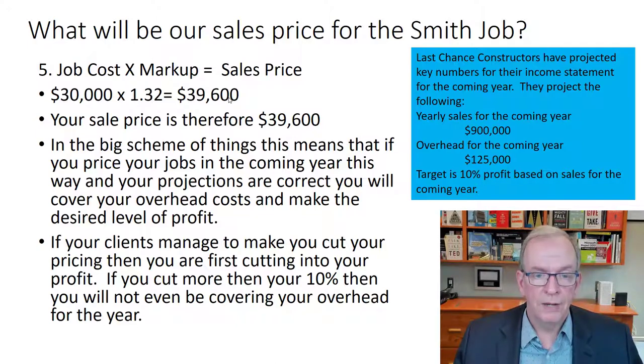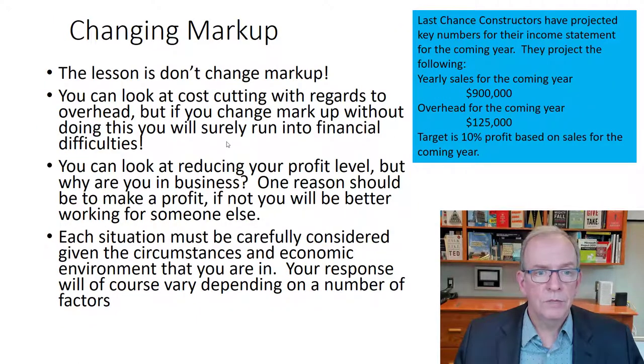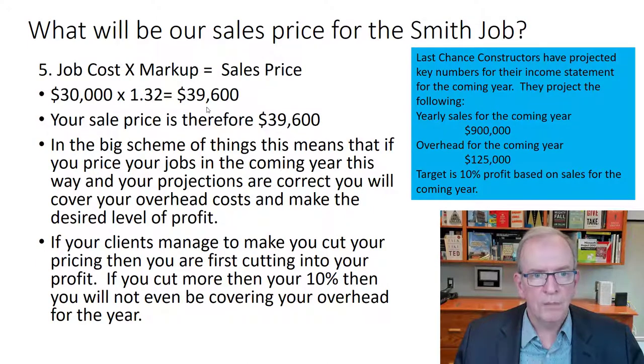that's $3,960 profit. Now you get some smart client that starts asking you a lot of questions and wants to cut the price down. You end up cutting $3,000 off that price. You're only getting $600 profit on this project then. Are you in business to only make $600 profit? I don't think so. Right?